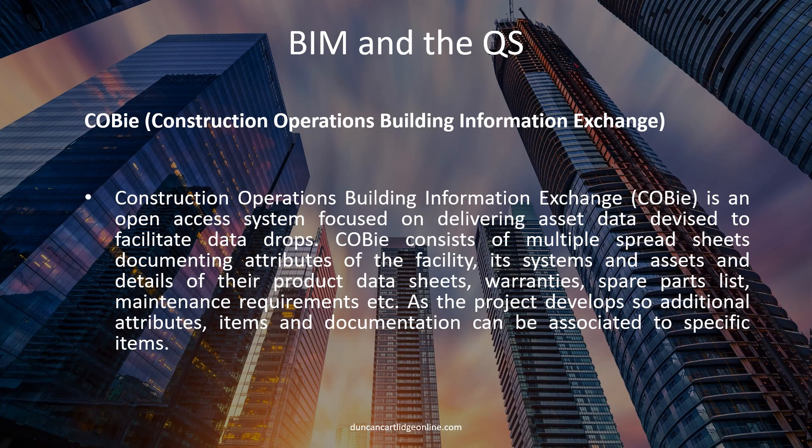Construction Operations Building Information Exchange, or COBIE for short, is a standardised data format required as part of BIM Level 2. COBIE provides details on spatial locations of the components and equipment of the project. The major aim of COBIE information is to highlight the equipment location and how the equipment is maintained. COBIE data can be exported from the BIM Authoring Software to Facilities Management Software. It is open access and takes the form of a series of worksheets completed for each project, which divide the assets into manageable chunks and help the gradual correlation of information during the different stages of the project.